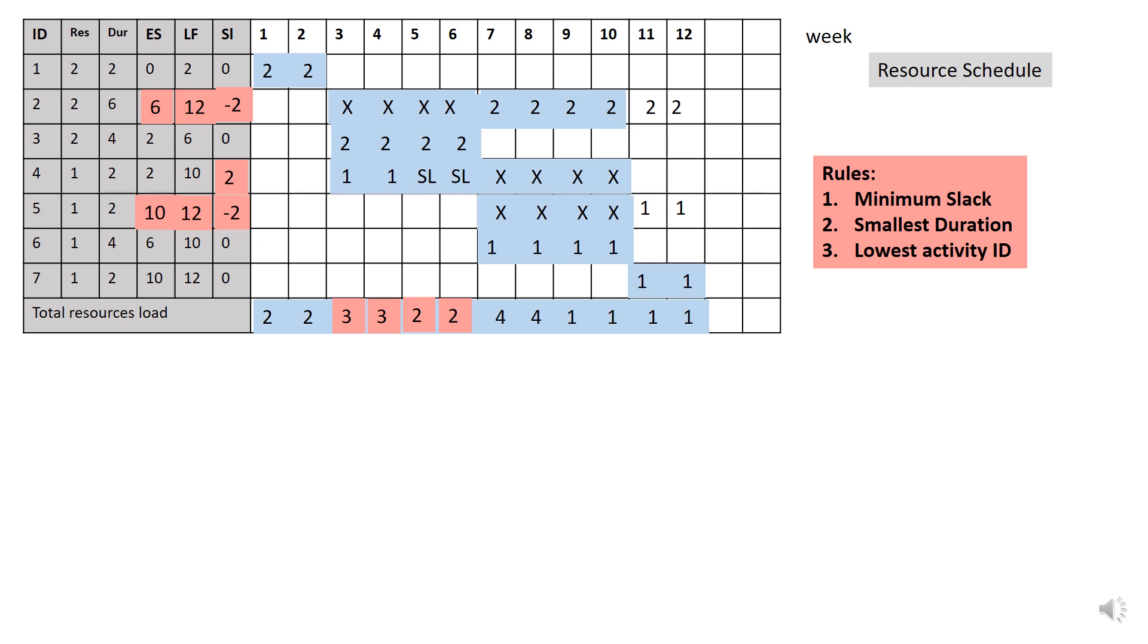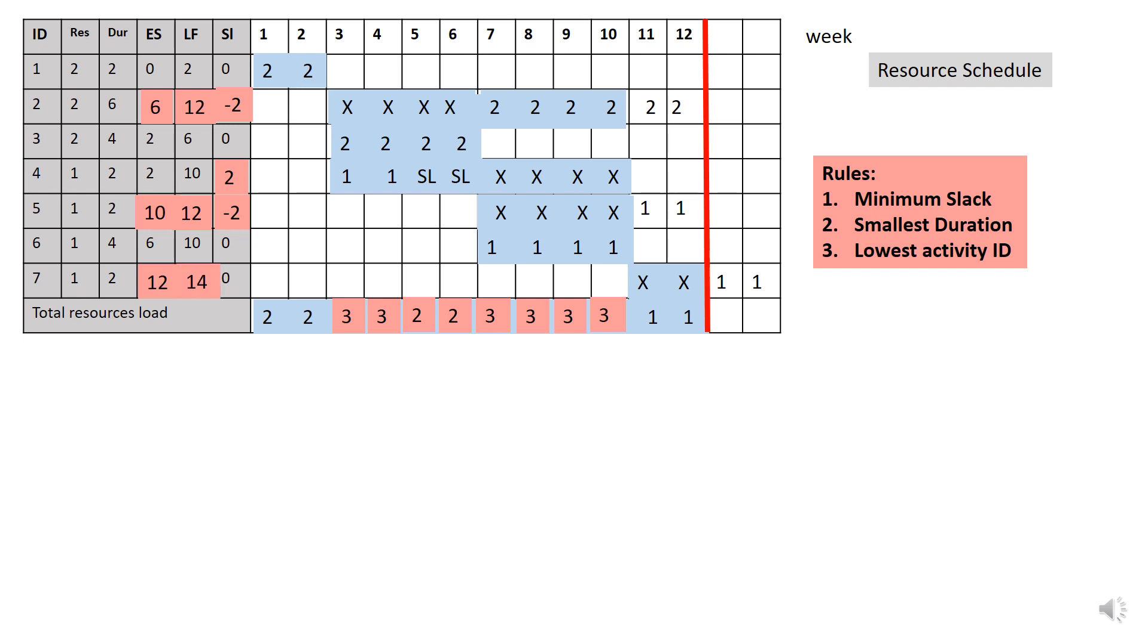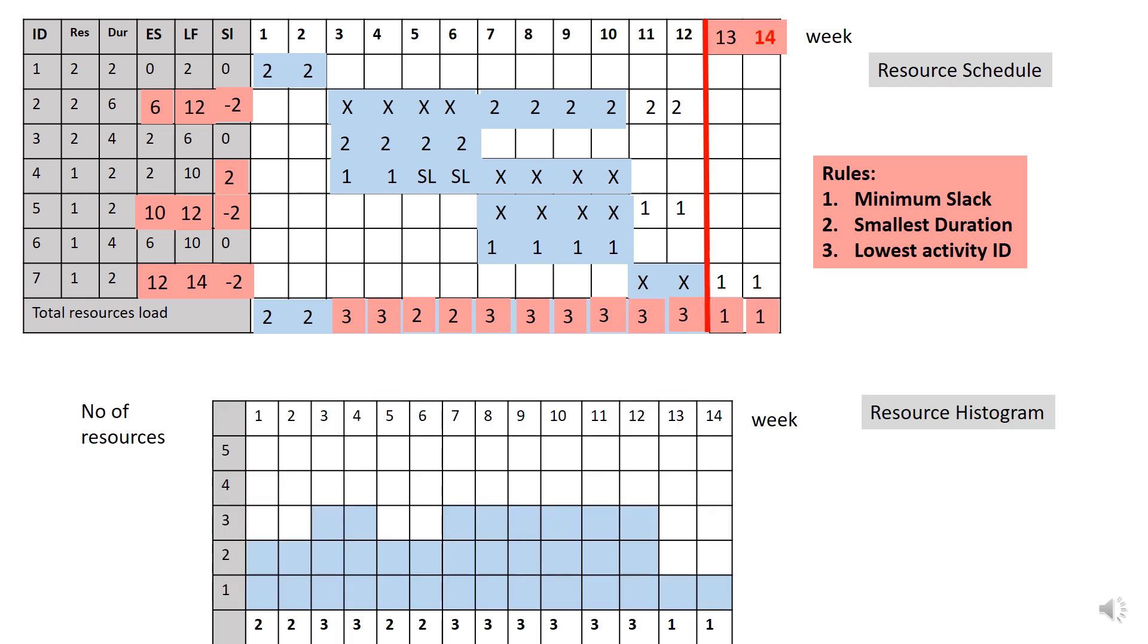And finally, activity 7 can only start at week 12. Since the total resources is already become 3, you notice that the project has delayed to week 14. So the early start for activity 7 is 12 and late finish is 14. Since we have shifted to the next 2 weeks, thus the slack has become as negative 2. So with the new total number of resources, we need to redo the resource histogram. It shows that all activity has been redistributed and no more than 3 numbers per week.